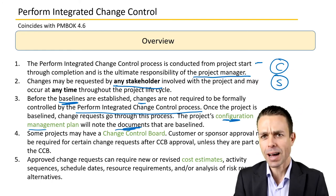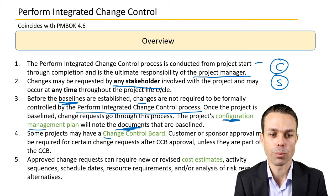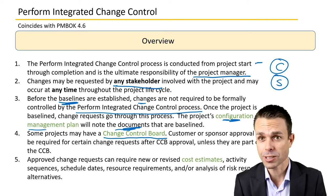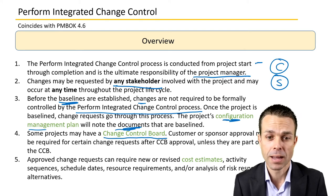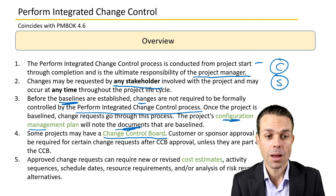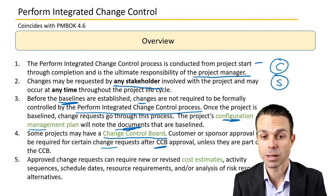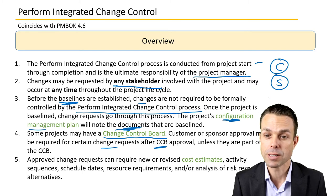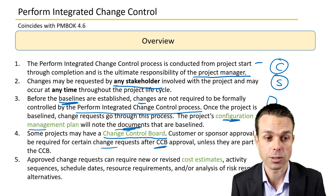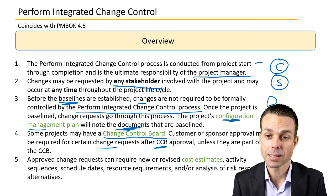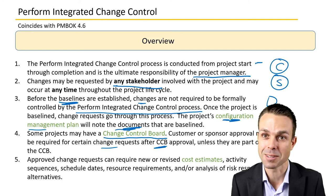If you're on a large enough project, it might have a change control board or CCB, which you'll also see come up in your exam. The customer or sponsor approval may be required for certain change requests after the CCB approval. So you might raise a change request, it goes through to the change control board, and then it still might need approval by the actual sponsor — the person sponsoring the project — unless they are a part of the change control board themselves.